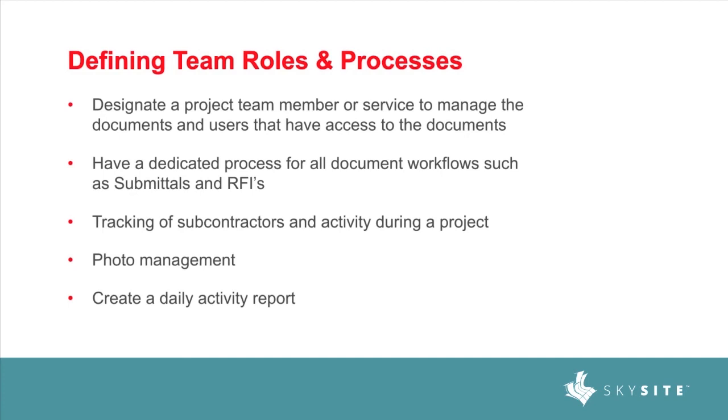What are your clients asking for in this as well, Dave? Yeah, I would say from a couple of years back, when we first started on some of our platforms, companies were asking for workflows. A workflow where if someone originates a submittal item, it can go on to different approvals. So we actually just released a submittals workflow, really tailored to having an actual workflow, not just I send a submittal item, I get it back, I send it on to the next person, but actually having it go through a process, go through specific different companies and specific approvals, and then everyone getting a notification once that submittal item's over, which extends itself to the accountability side, is what a lot of our clients were asking for.